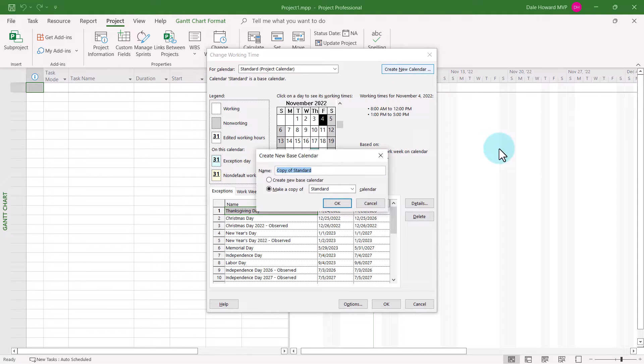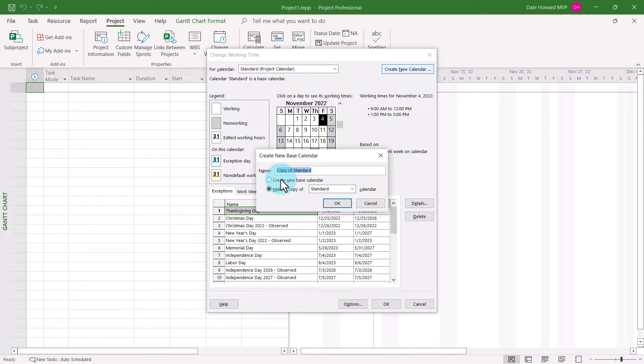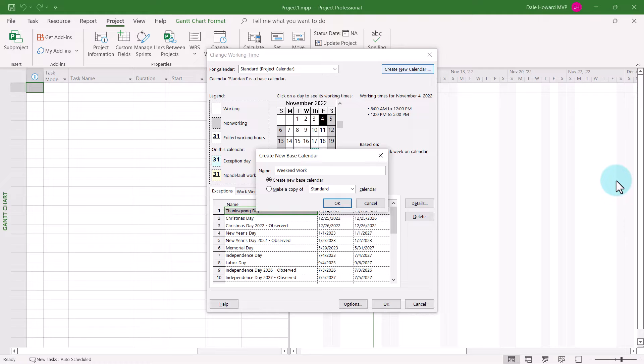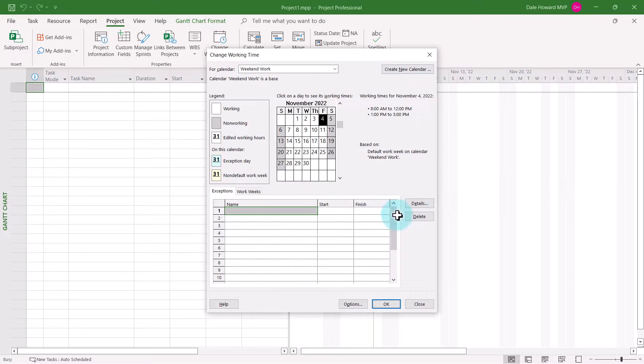In the Create New Base Calendar dialog, select the option Create New Base Calendar and then replace the default text with the name of your calendar. I'll call this calendar Weekend Work. Click the OK button when done and Microsoft Project will now select that new custom calendar.